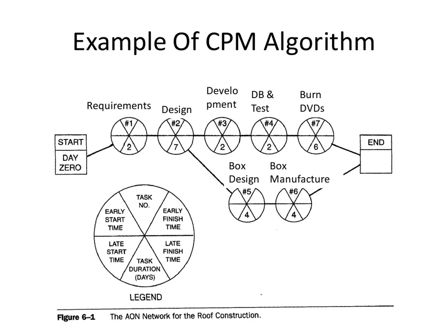Yeah, it depends on finishing. Remember, this is a finish to start dependency. It depends on finishing this previous task. It can't proceed until the previous task, number 1, is finished. So it's associated with an early start time, the time before which it can't possibly start because the preceding things haven't finished, of 2, okay? What's the earliest that it could finish? This is a 7 at the bottom. 9, good. Okay, next task here to the right.